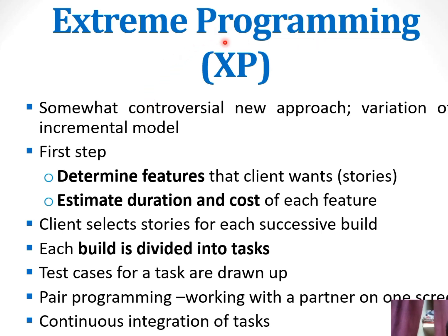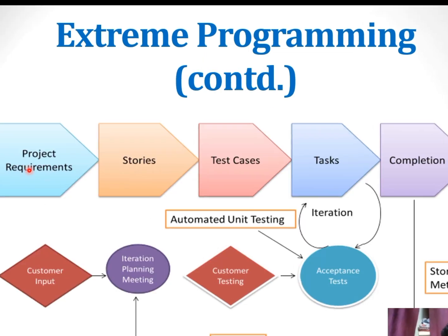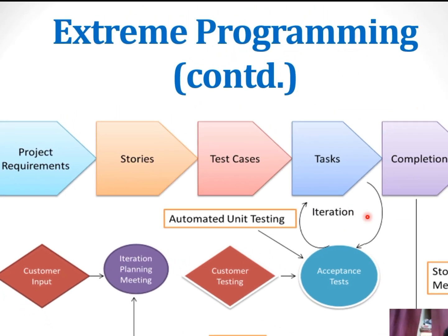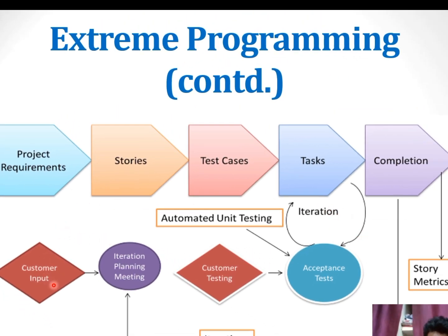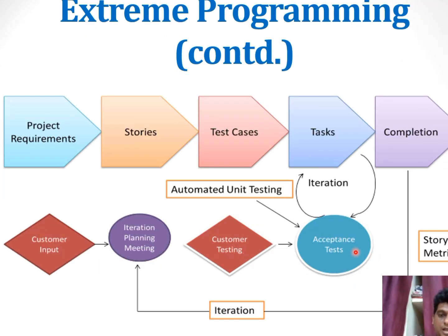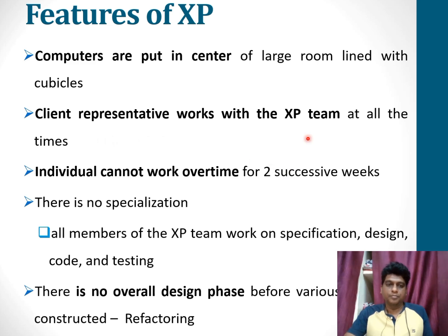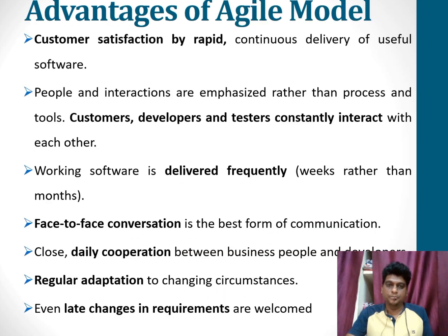The next type is Extreme Programming. Based on determining features, duration, and cost, the working module is divided into several tasks. Project requirements are classified into various tasks, and with the help of the iteration rule, customer input and customer testing are obtained. If accepted, it proceeds to the final version; otherwise, the iteration process is repeated, and a meeting is held with the customer and developers. A key feature is that clients work with the programming team in iterations no longer than two successive weeks, and all team members work on all phases including specification, design, coding, and testing. There is no overall design phase.